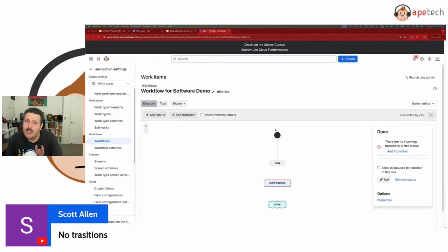And this is a little cheat code that I use. Earlier, when I was trying to remove that backlog status, what I do to cheat, especially if the project is new and I'm too lazy to make the copies and go through all the other hoops, is I simply remove any transitions to that status, and that status is by Jira's definition gone. The only time this doesn't work is if you already have a bunch of issues or work items in that status. They will stay in that status, and now you kind of break the whole thing. So don't do that on a very active workflow.